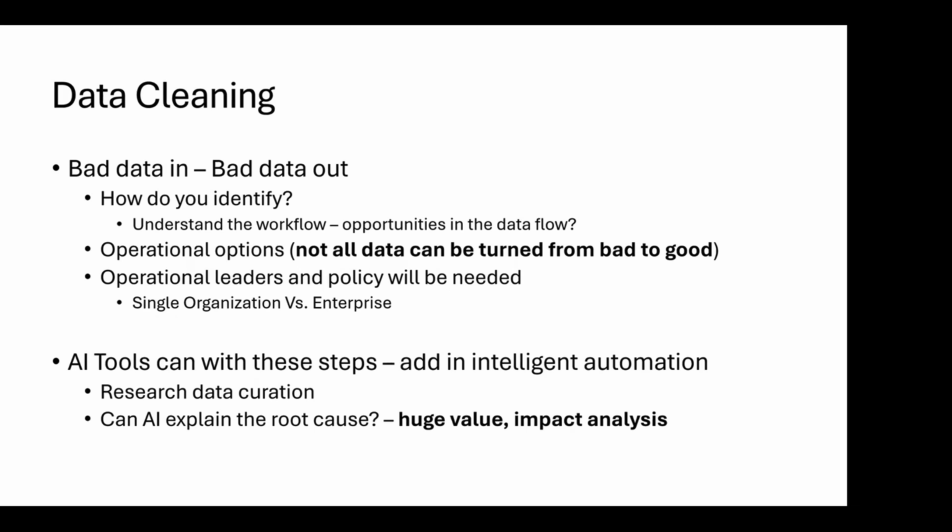But it's about understanding the workflow, and I think of it in terms of the data. A great example from Don is, you think of a nightclub, they have a bouncer. Bouncer's outside. But once you get inside, there's not a lot of bouncers anymore. So when you're looking at the data flow, you've got a couple opportunities during migrations, because you have the source, you have a transfer mechanism, and then you've got a destination. In some scenarios, and again, the same vendor or application may be playing multiple roles, but you've got really at minimum 3 places where you can check for data with whatever constraints you have.